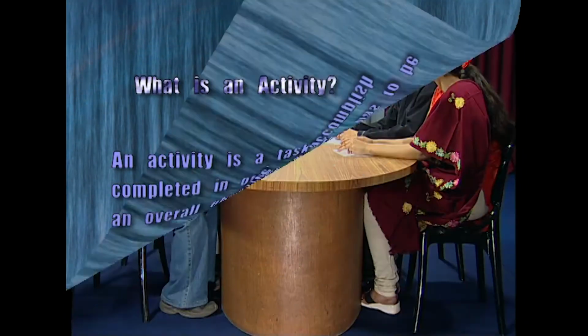Now that's an activity. Setting up a building in itself is a huge activity. You can break that down into smaller and smaller components. Maybe you do the foundations, then you set up the columns, then you cast the slabs and the roofs. Then you install machineries, and then you commission the machineries. You give a trial run. So these can be looked upon as activities.